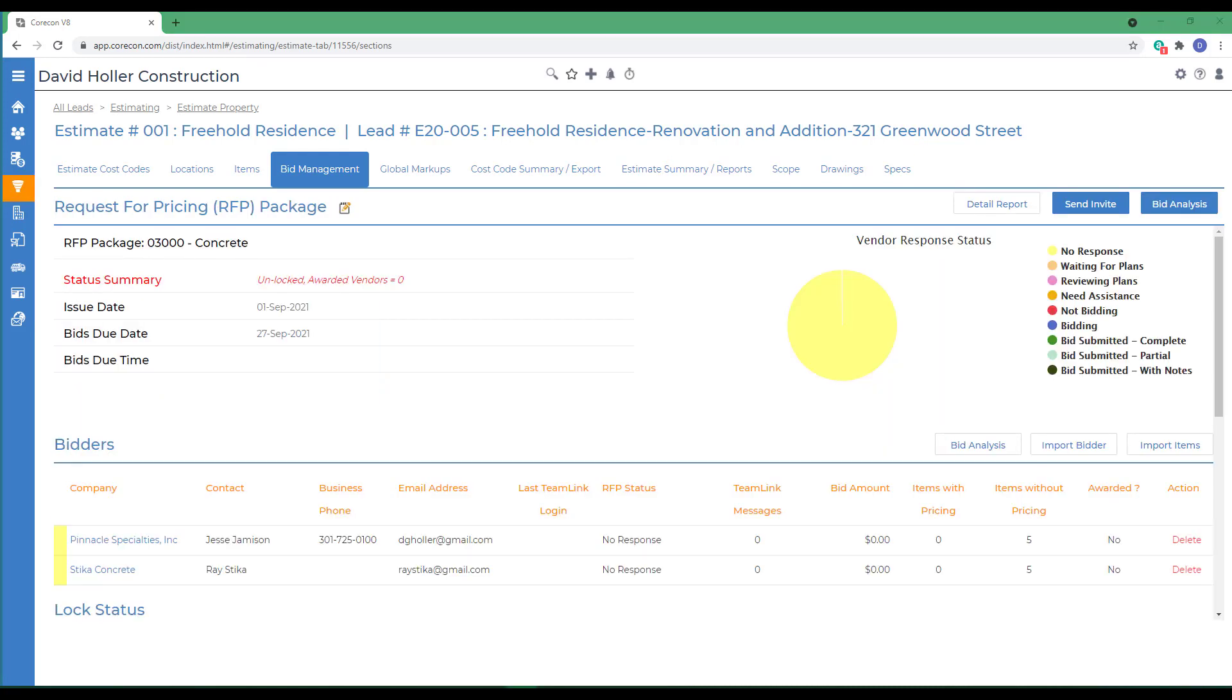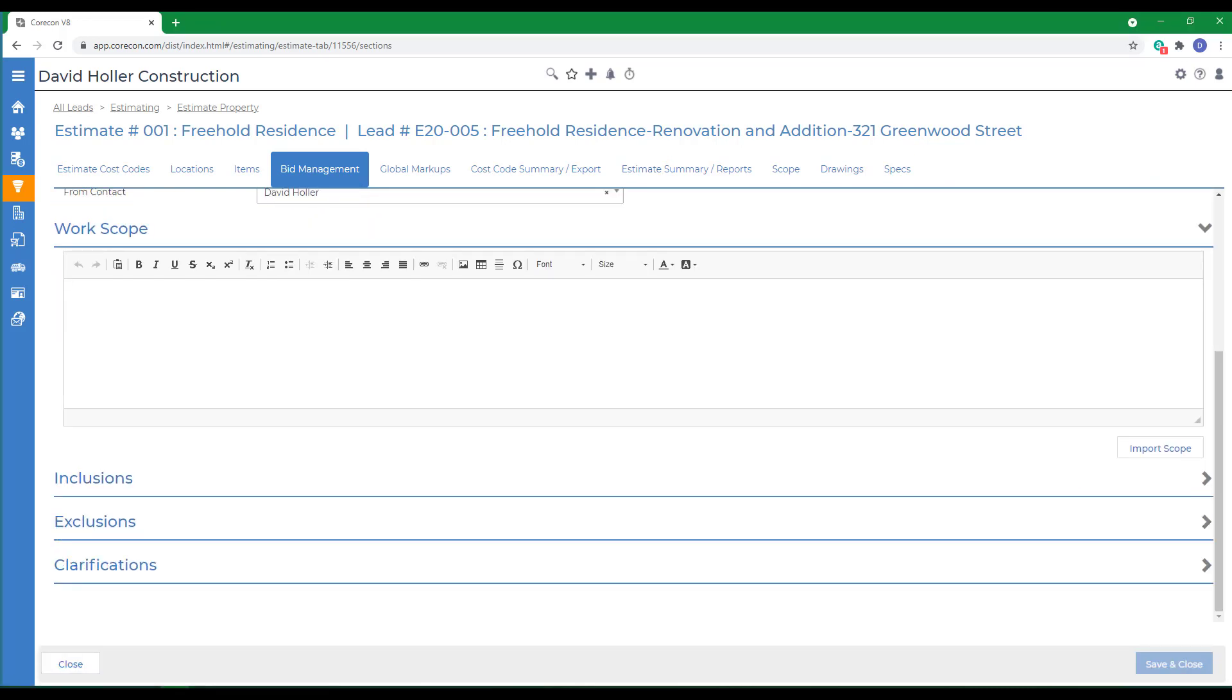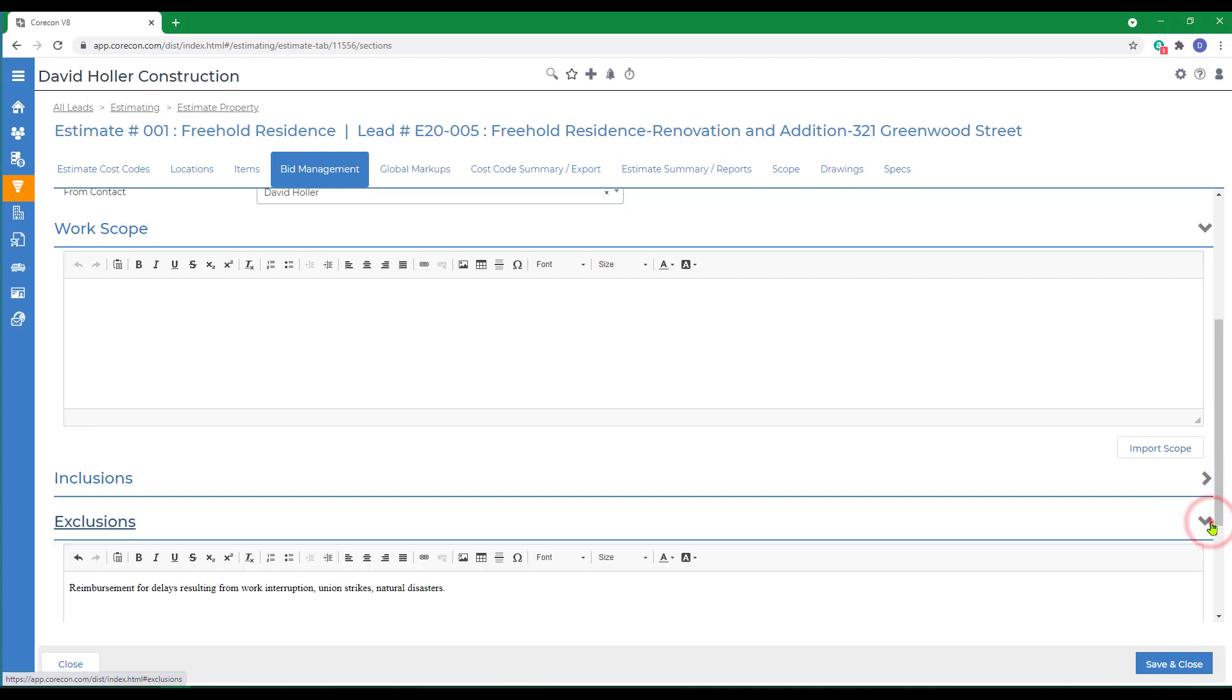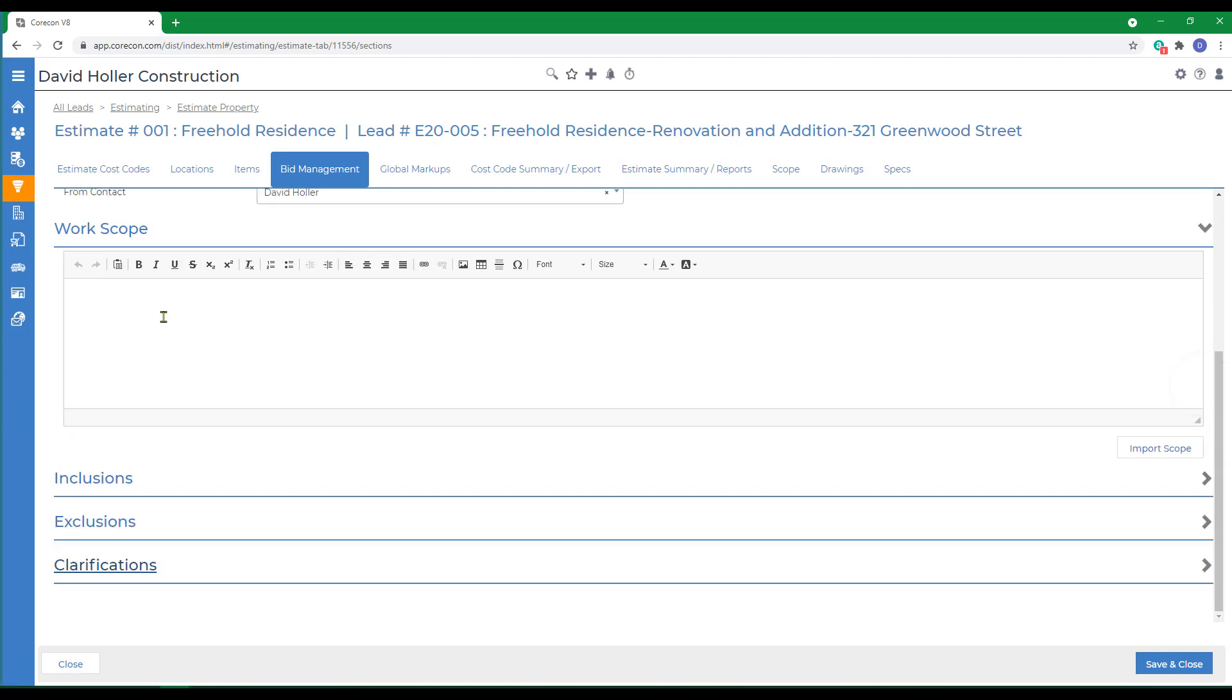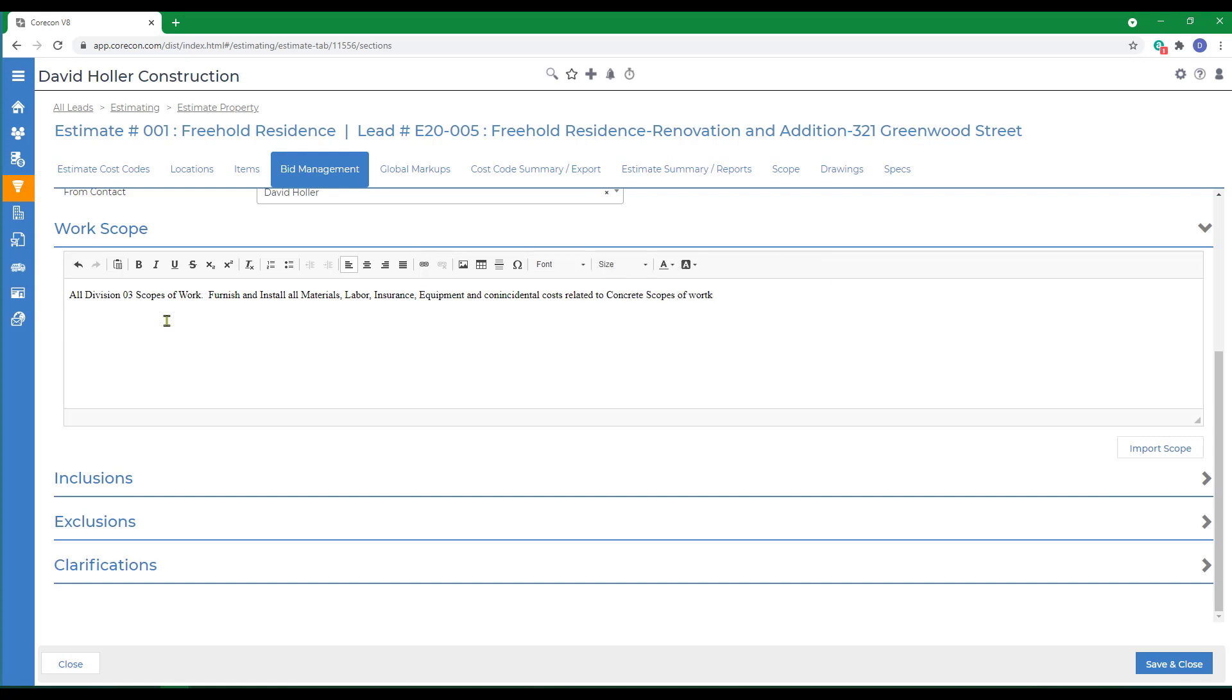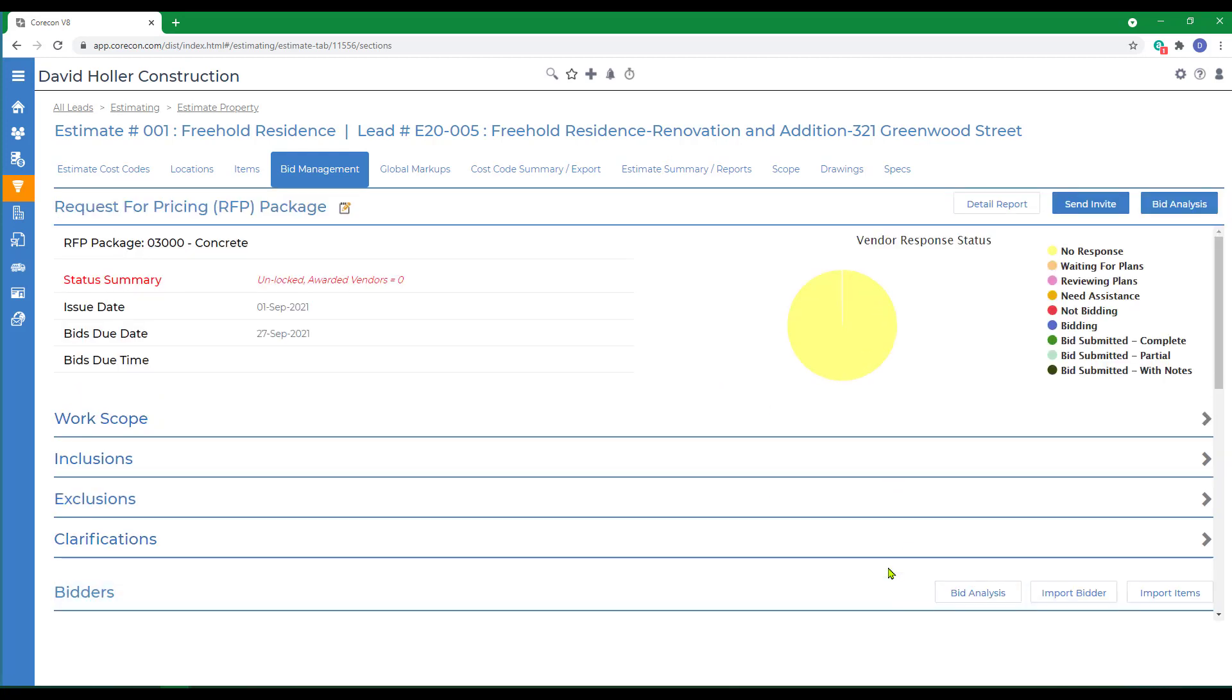The next step is to make sure that the scope came in properly, so we'll click the Edit button and scroll down. We'll check to make sure that the Inclusions, Exclusions, and Clarifications were all pulled into the RFP. We also need to give a little more specific work scope. I'm using something very simple, but we encourage you to spend more time on scope than I did, and click Save and Close.